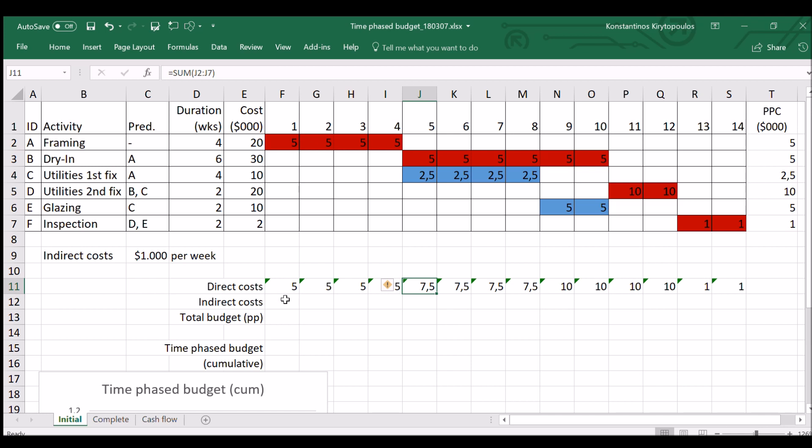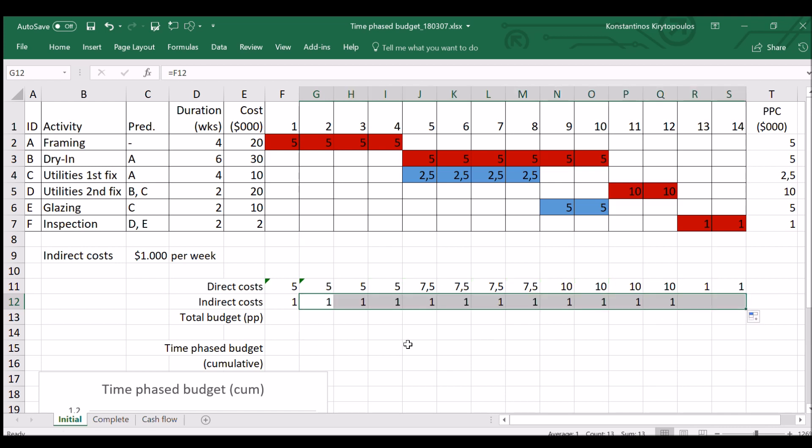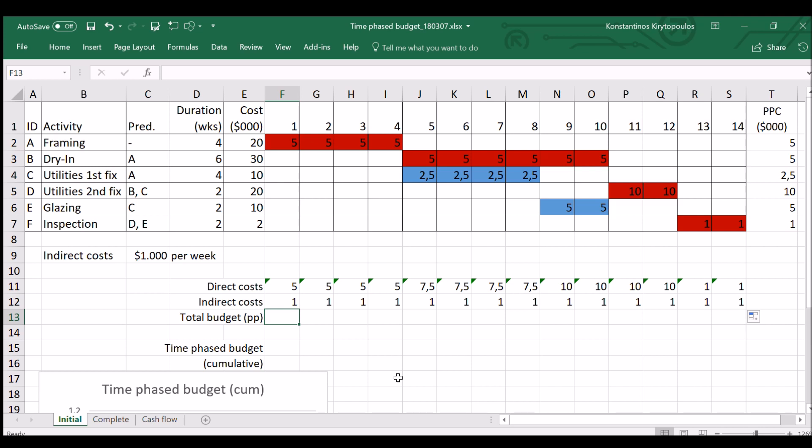But we also have some indirect costs each week. Remember that these are expressed in thousands. So $1,000 per week would be one here, and that would be the same for every week. This is how we work out indirect costs, same every week or every period if you prefer. And the total budget will be the sum of direct and indirect costs.